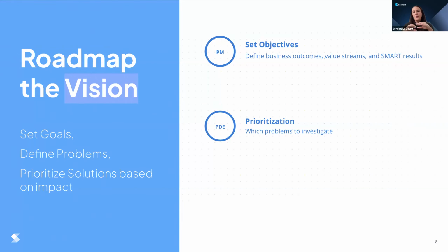You're going to try to glean really early, rough ideas of impact and effort for each problem. And if we don't know enough, that's fine. You schedule some investigative spikes on the technical side, or maybe we're doing a little bit more user research to find out more and figure out what is the right solution for this problem.